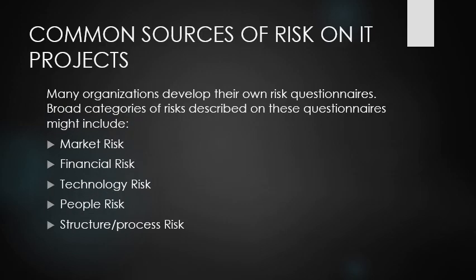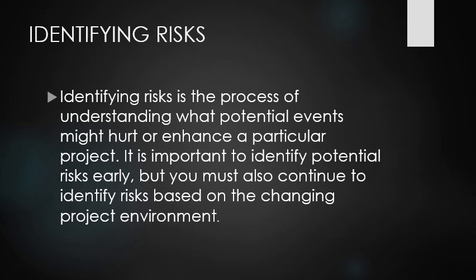Many organizations develop their own risk questionnaires. Broad categories of risk described in these questionnaires might include market risk, financial risk, technological risk, people risk, structure or process risk. Identifying risk is the process of understanding what potential events might hurt or enhance a particular project.